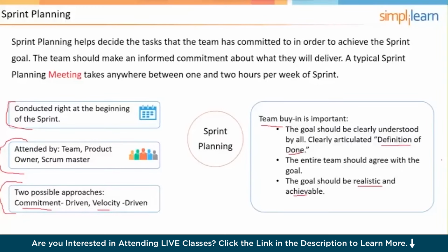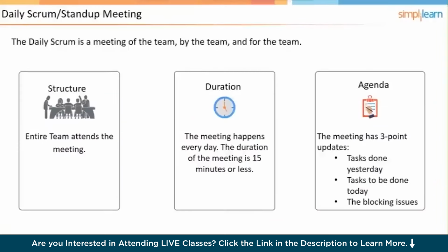Okay, the Scrum meeting, daily Scrum, we've talked about it, right? The entire team attends the meeting. Could the product owner be there? Yes. Does the product owner need to be there? No. Sometimes the product owner can be an impediment to the meeting, but would be welcome. But if the product owner started asking questions or became the focus of questions being asked, the Scrum Master would have to help facilitate a change, because that would not be effective for the daily Scrum.